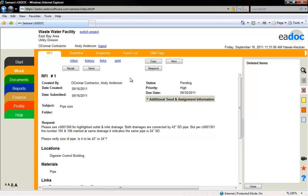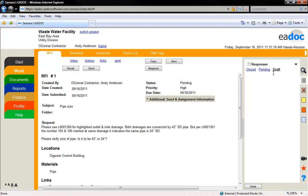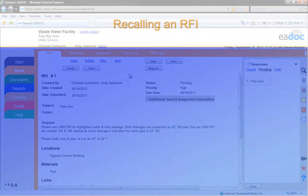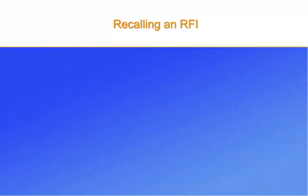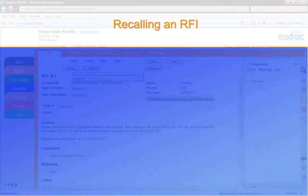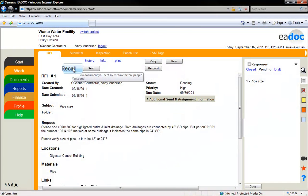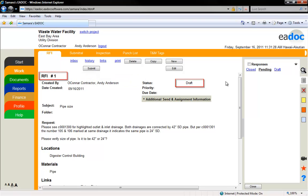Notice how the document has been assigned a number by eDoc and it is under Pending in the Browse box. If you realize you need to edit the RFI, you can recall it to a draft status. The assigned number will stay with this RFI and cannot be adjusted.